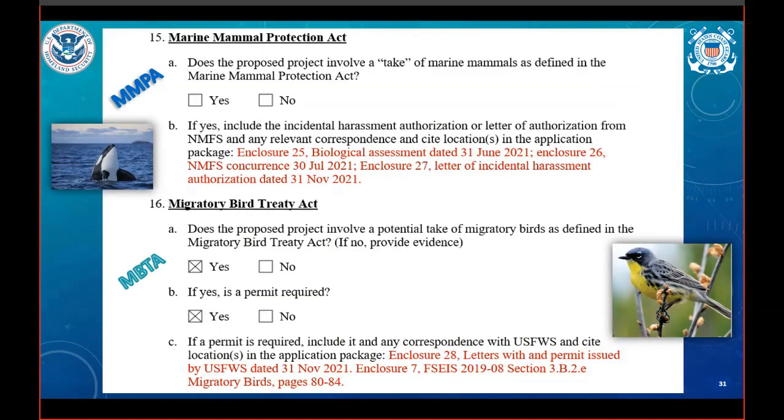Jamie, this is Aaron with FHWA. I'll also just make a quick comment that here in Georgia, typically our ESA and EFH consultations are done separately because there are two different NMFS offices that we coordinate with. So just a note, in Georgia those are typically handled separately. That's interesting and good to know. Thank you for sharing. Like I said in my presentation, sometimes you'll see that they fold EFH right into ESA, so that's good to know, particularly for Georgia projects.